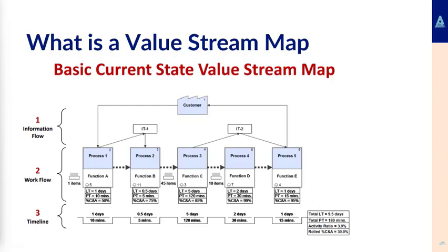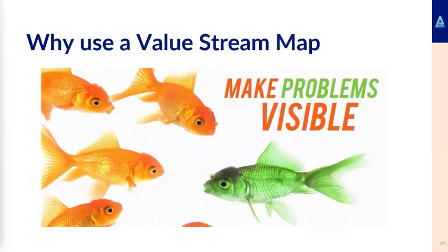And that's just what you do. First, you do your current status value stream map. So currently, what have we done for the last slab? How long did it take? Or the last 3 slabs, if it's a lot of repeat process on that construction job. And you'll find that on construction jobs, on projects, there's a whole range of tasks that are repeated.